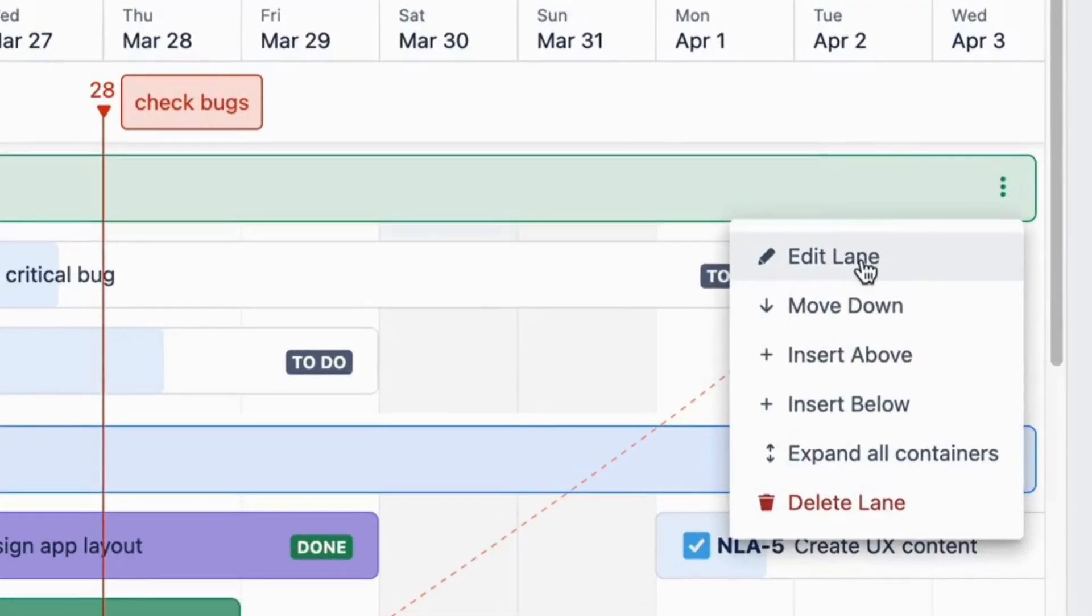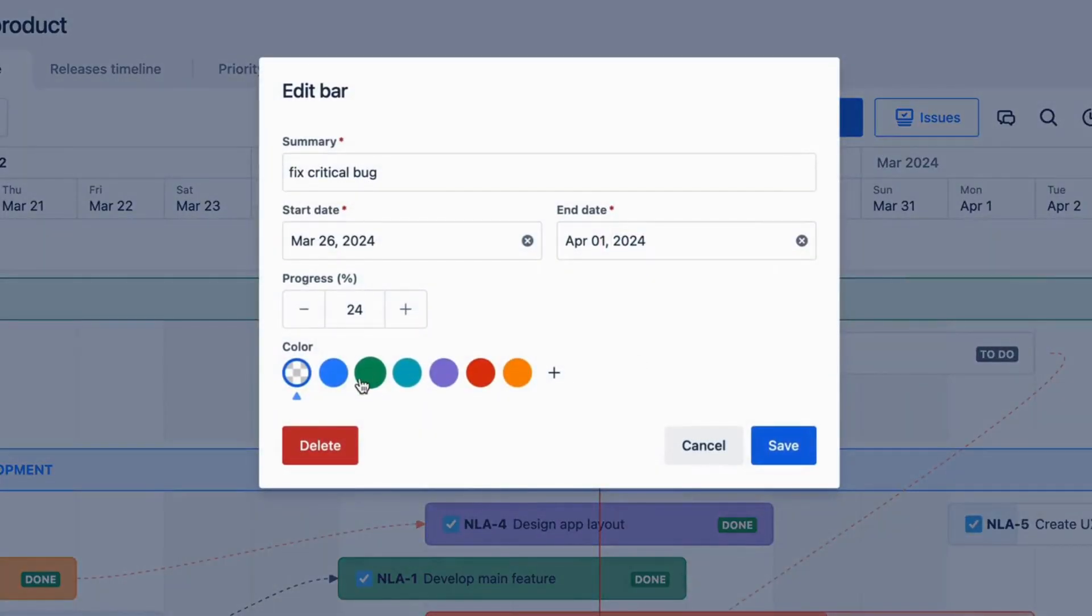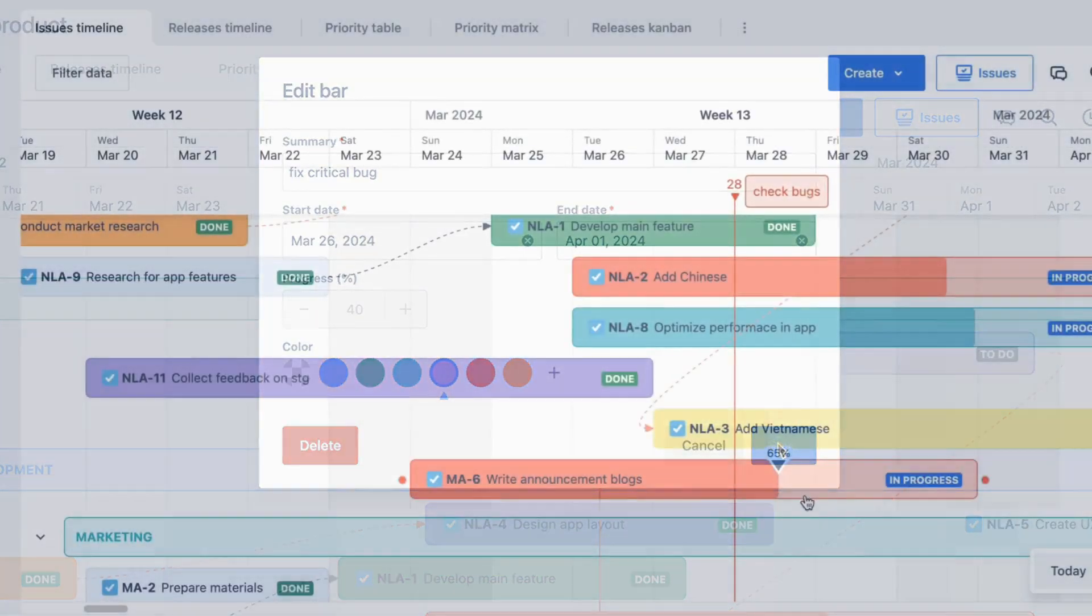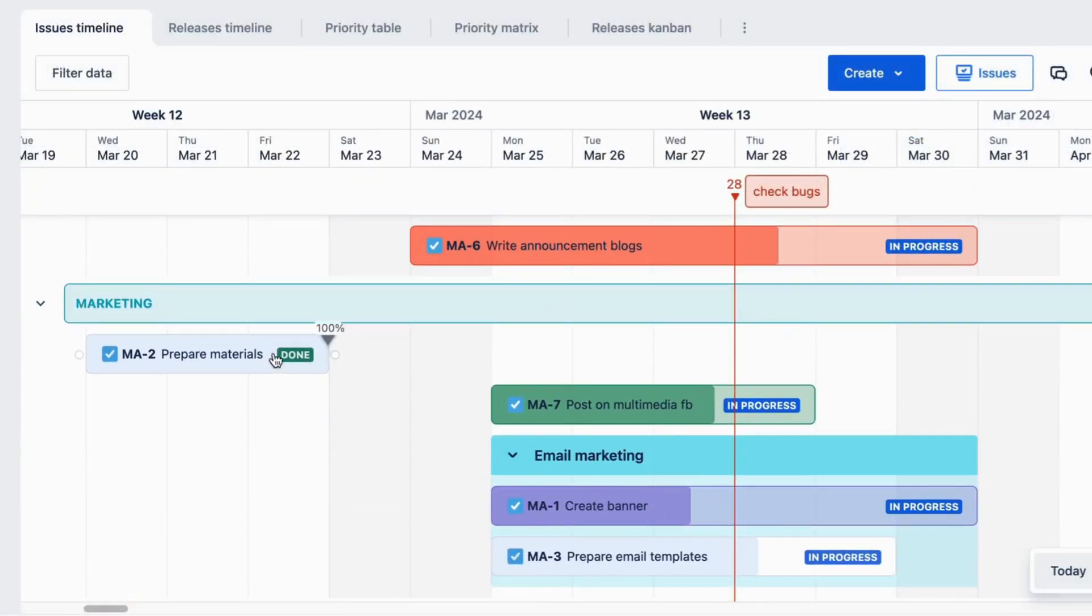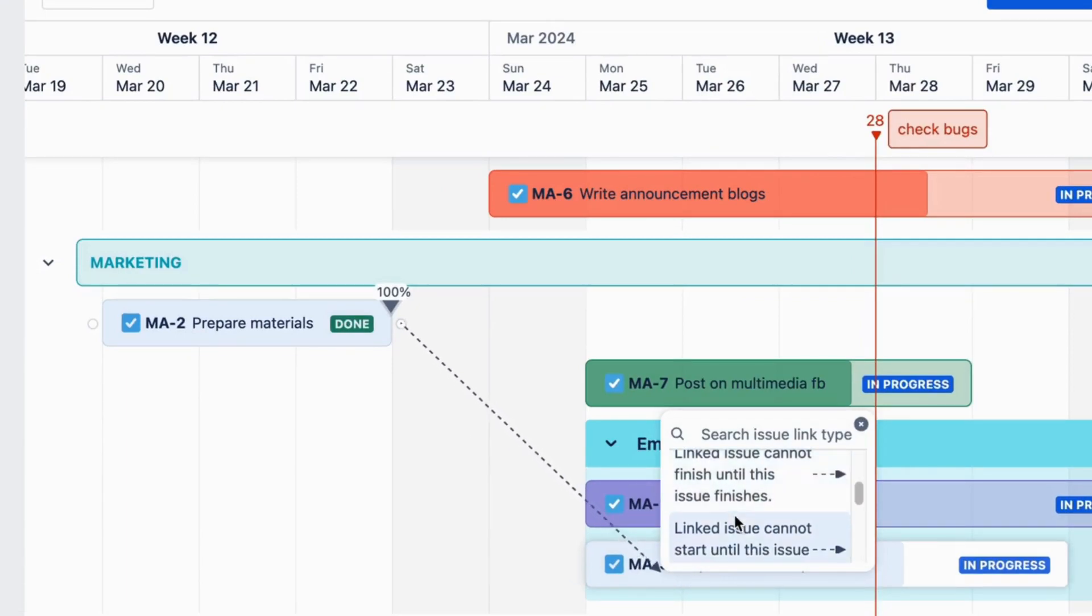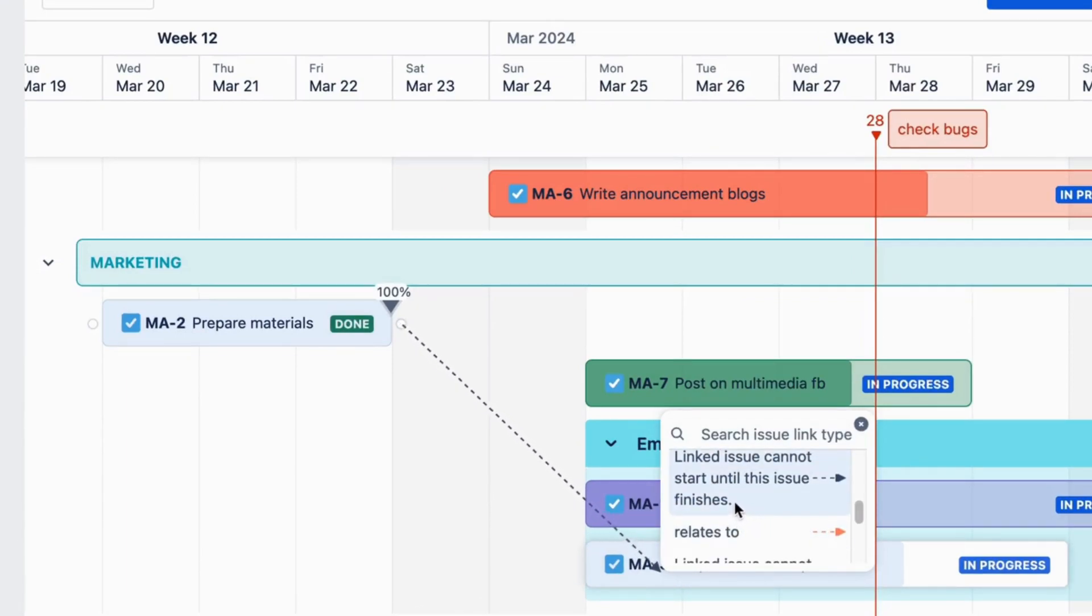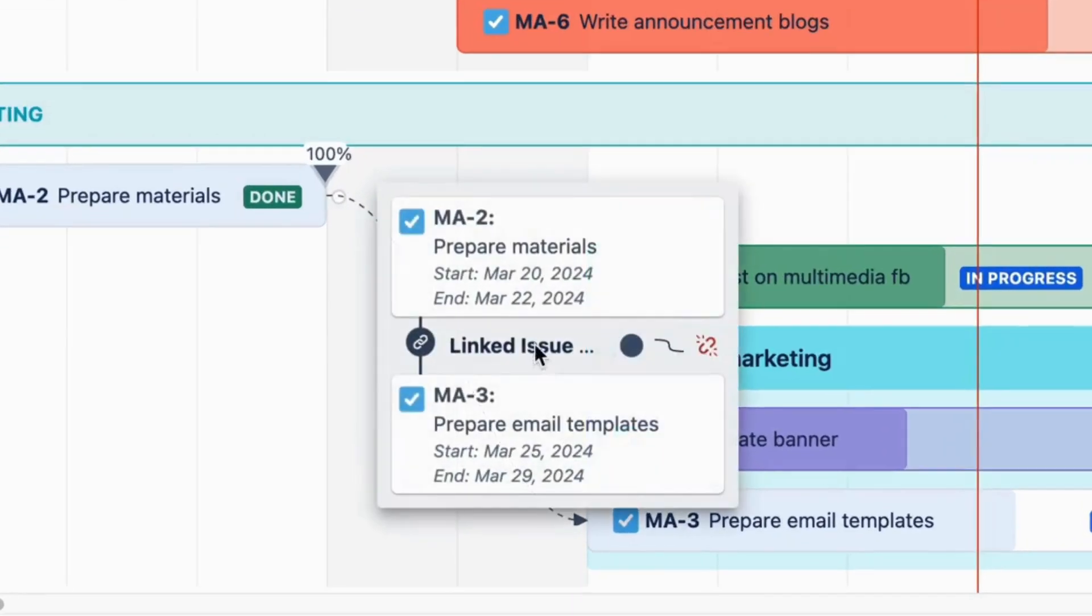And don't forget that you can always edit the lane's name and position, adjust issue card titles, and color directly on the roadmap. You can also create dependencies between one another. This feature helps you visualize the relationship among tasks and their interdependencies, which plays an important role in successfully executing projects.